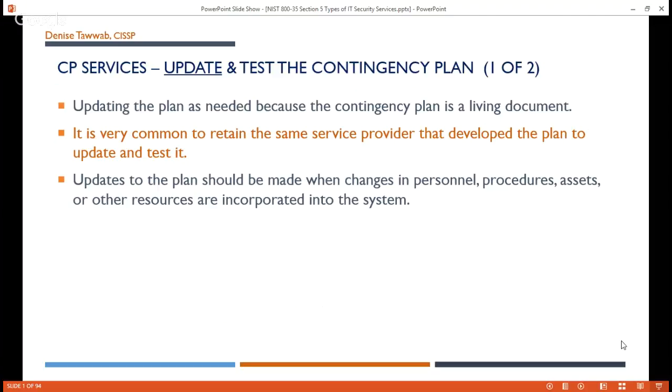If you build, for instance, a contingency plan based on having an expert systems network guy, he's just an expert, he or she, and this person can be counted on, they've been there a while. Well, if that person leaves the organization, that's going to change. It might change what happens as technical expertise moves in and out of the organization. You do want to keep that in mind. And that may have not been the best example, but you understand what I'm saying. When something changes, change your contingency plan.